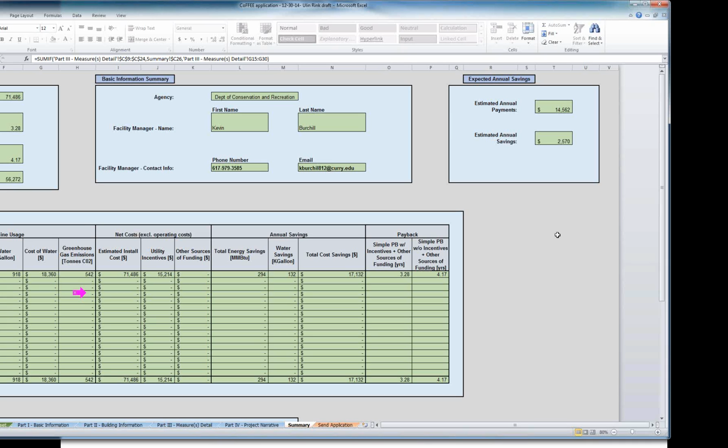We do the 85 percent of that just to give a kind of a buffer on the savings. The savings could be less or they could be more. But if we put it at 85%, I think that's a good industry standard that we found.